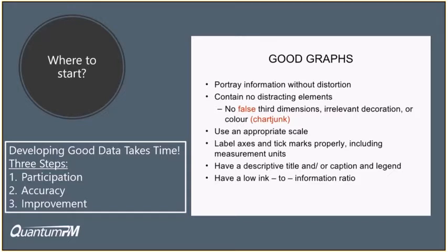So you want to make sure that there aren't any things going on in your organization that would make people reluctant to tell the truth. I've certainly seen organizations where anybody who had a project that wasn't in a green status was in trouble. So they would do whatever they needed to do to make it look green, make it look like everything was going well, and just delay the inevitable when everything would come together and crash on them. Not really a great way to manage a project, but you can get really good reports. They look pretty, but they're not accurate.